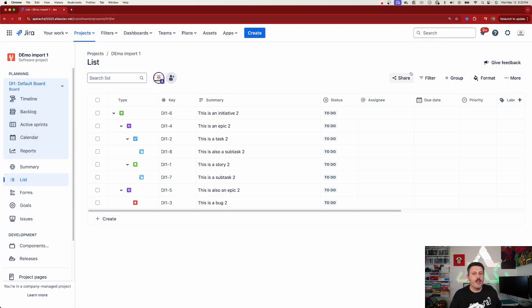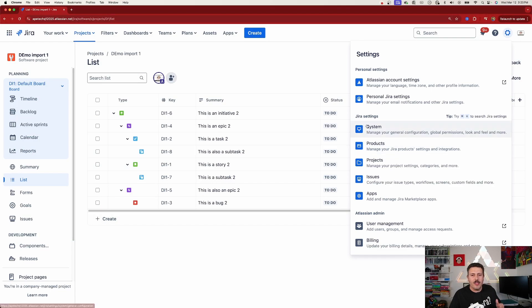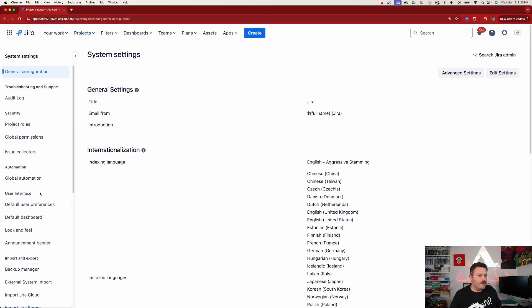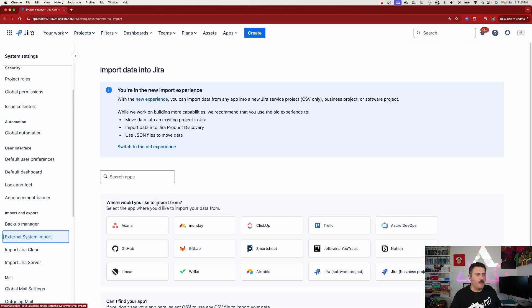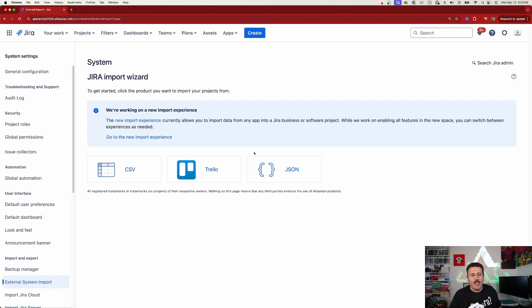So that's how to do it using the new import process. The biggest problem is you are forced to create a new project, which is not ideal nine times out of ten. Now let me show you how to use the old experience to do basically the exact same thing. Go back to Jira, click the gear, go to System, go to External System Import, and this time click 'Switch to the old experience.'